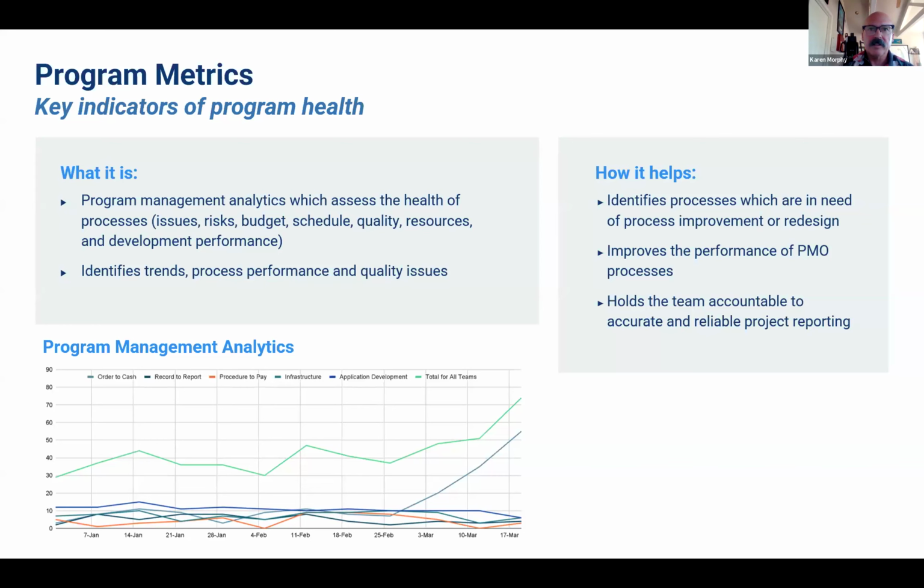And the point of this one is, wouldn't it be good if you really had a report card on your decision making? And most projects have a decision log. And wouldn't it be good if you had some way to track, are we making decisions on a timely basis? And what teams are having most of the decisions? Why is it this team has no decisions to make? Isn't that odd? It will help you raise a number of questions.